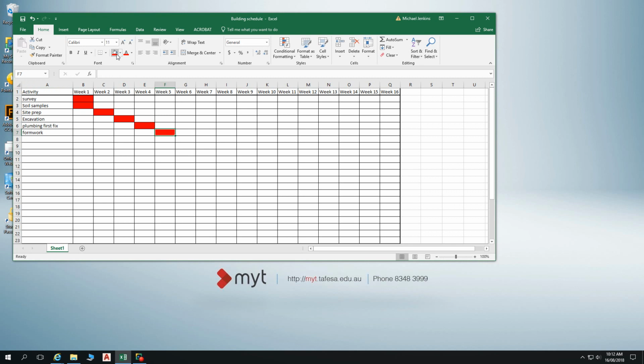So we've got our formwork in place. What's the next thing that's going to happen? Concrete slabs getting poured. In that process, we'll probably also phone the council as well. So formwork's in place, all the steel will be fixed. Then before any concrete goes in, we phone the council. So we're at footings stage. If you want to inspect the steelwork before the concrete goes on top of it, it's the last chance to do so. So we let them know about that.